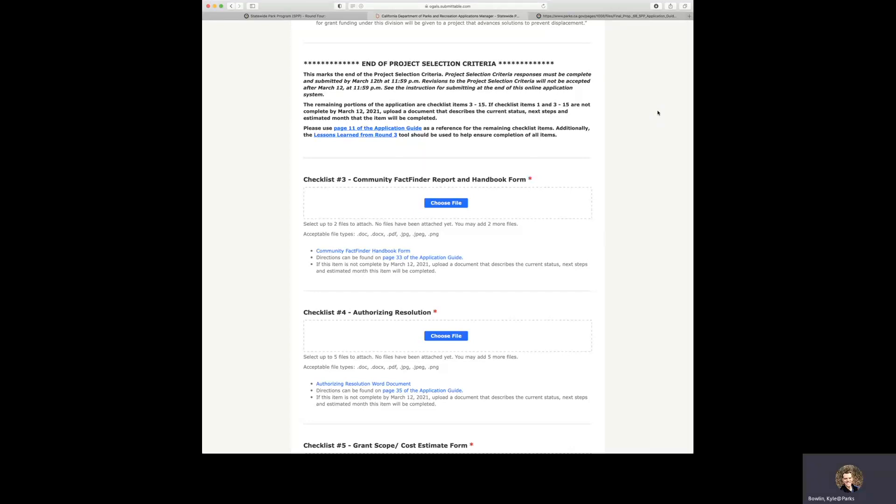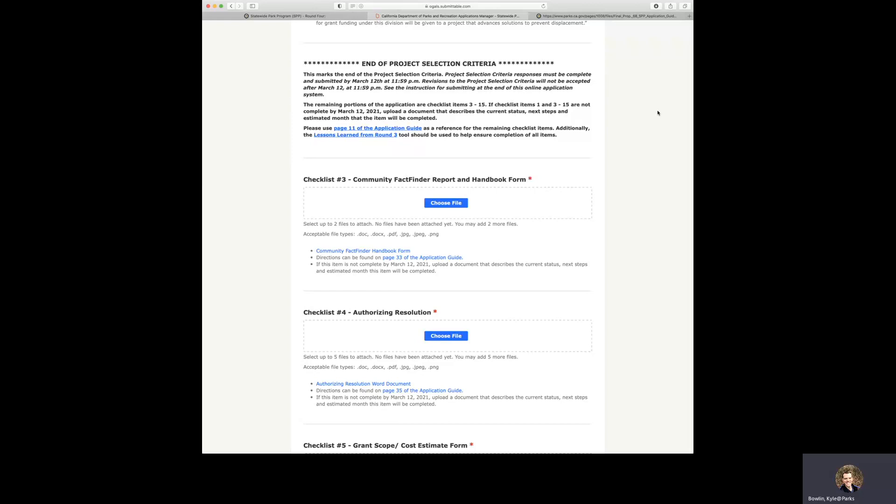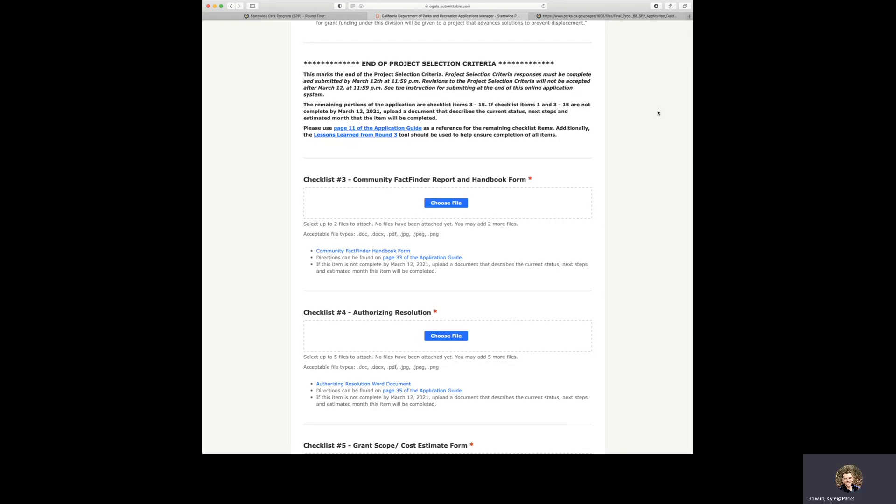As a note, if checklist items 1 and 3 through 15 are not complete by March 12, 2021, upload a document that describes the current status, next steps, and estimate a month that the item will be completed. Also, please use page 11 of the application guide as a reference for the remaining checklist items. Additionally, the lessons learned from Round 3 tools should be used to help ensure completion of all items.